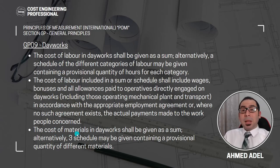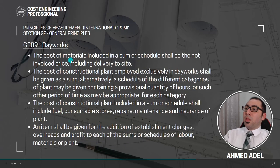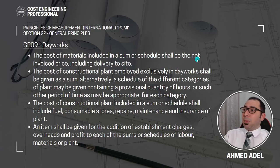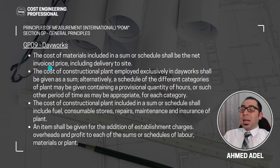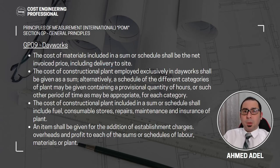Day works can also include materials. The cost of materials in day works shall be given as a sum. Alternatively, a schedule may be given containing a provisional quantity of different materials. The cost of materials included in a sum or schedule shall be the net invoiced price, including delivery to site. For example, if you keep a rate for the supply of sand, the rate is how much one cubic meter of sand is invoiced to you plus delivery to site.